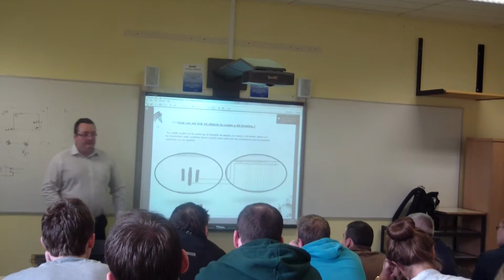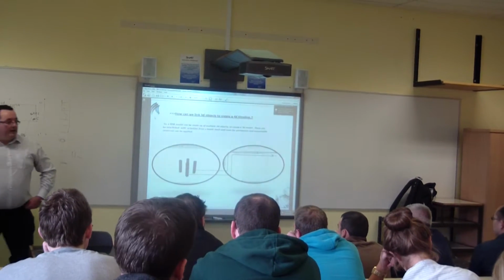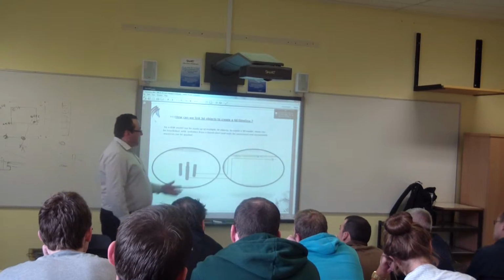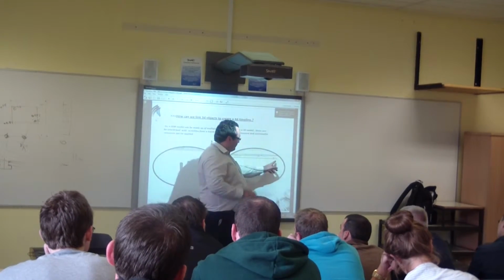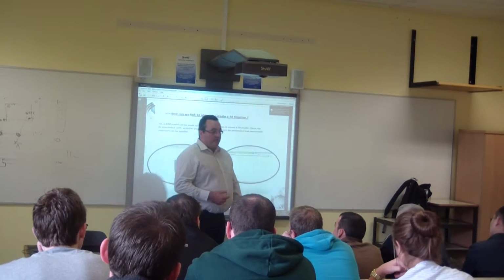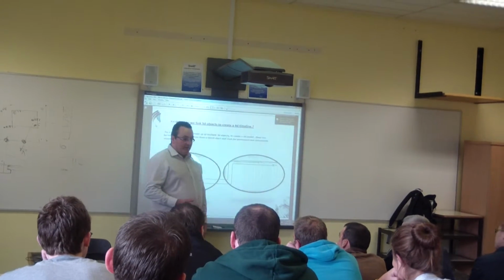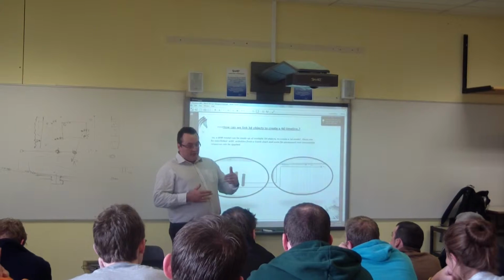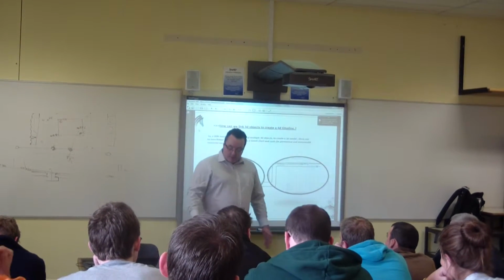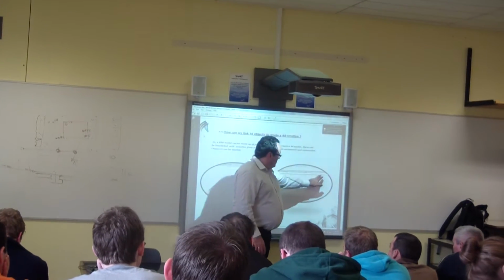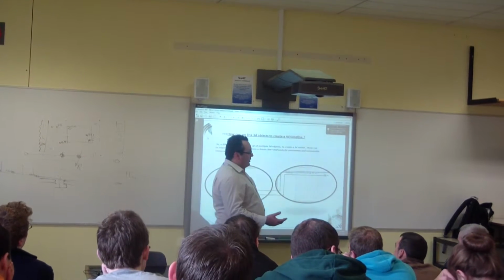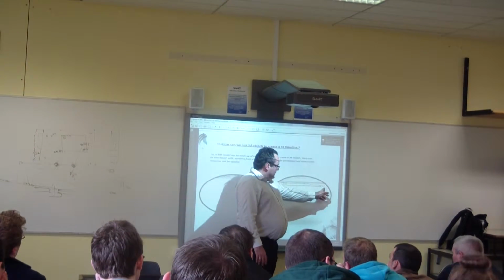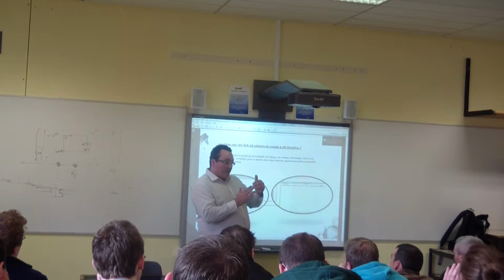Does everybody understand that? Is that using payment as well? Yeah, you can do that. You can use your payments, you can put a milestone in there. We call it sectional completion milestones. So for example, with the NEC3 formal contract in the GCC, you put in sectional completion milestones. So when you do a program, you say for example, level 1, columns, you have a little milestone in there, and you baseline that milestone.